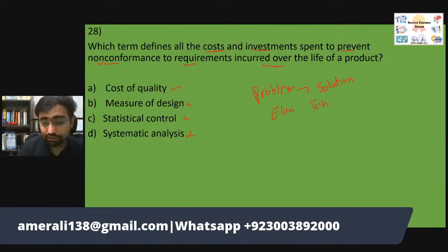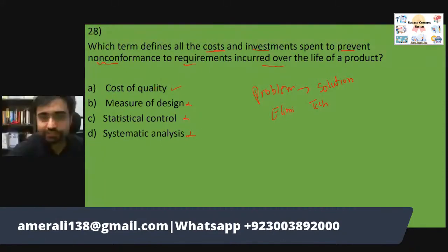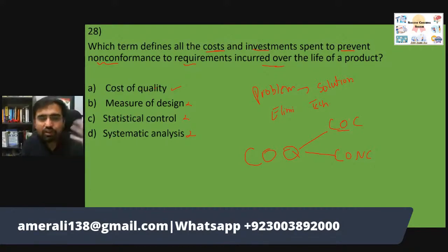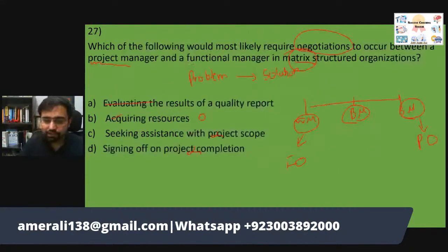These are not the answer, but even if you get an option as the right answer, still using the elimination technique is highly recommended. Cost of quality is the cost that you spend in order to build quality. So you have cost of conformance and cost of non-conformance. Cost of conformance is more of a preventive cost, money spent to avoid any kind of failure. Cost of non-conformance is more of a reactive cost, money spent due to failure. Warranty also comes here.